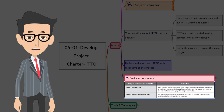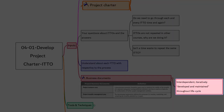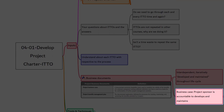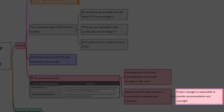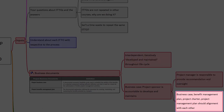I hope you remember our earlier discussion in the introduction session. Business documents contain two documents: one is the business case and the other is the benefits management plan. These two documents are interdependent and iteratively developed and maintained throughout the life cycle of the project. The project sponsor is accountable for the development and maintenance of the business case, whereas the project manager is responsible for providing recommendations and oversight to keep the business document in alignment with the goals and objectives of the organization — not just the business case, but also the benefits management plan, project charter, and project management plan.